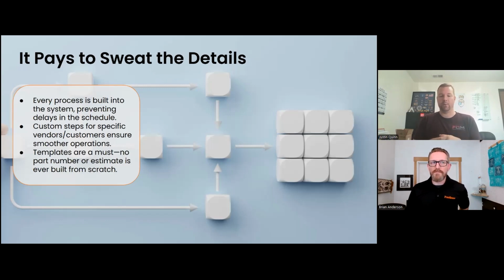It was, we had missed this on our traveler that material needed to be ultrasonic inspected. And what actually caught us is our material vendor said, "Oh, all 7,000 plate will come to you ultrasonic inspected." So we just kind of took that as a, hey, we just order it from the vendor and it comes ultrasonic inspected. Well, we ordered a very thin piece of aluminum under a 1/4 inch. Well, there was a caveat that we didn't know that under 1/2 inch or something like that does not come ultrasonic inspected. So we pushed through the entire order, made the parts, sent them to plating.